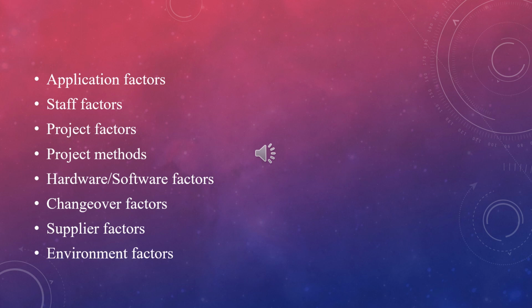The next category of factors include environment factors. Changes in the environment can affect a project's success. For example, a significant change in the taxation regulations could have serious consequences for the development of a payroll application.